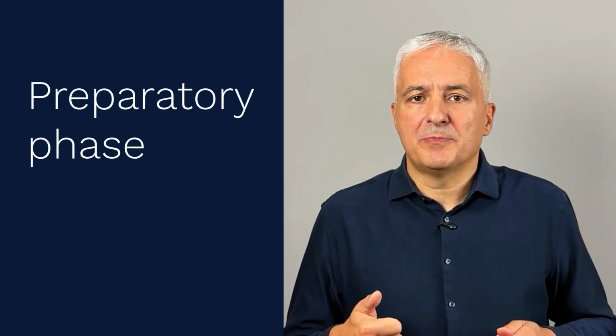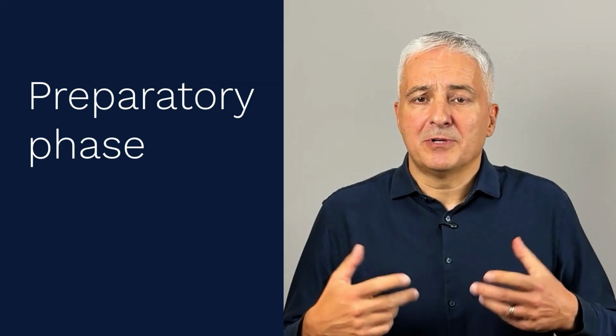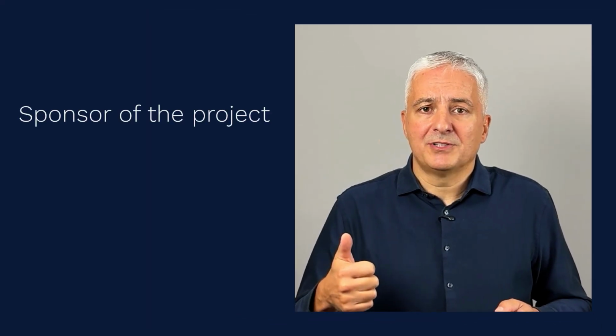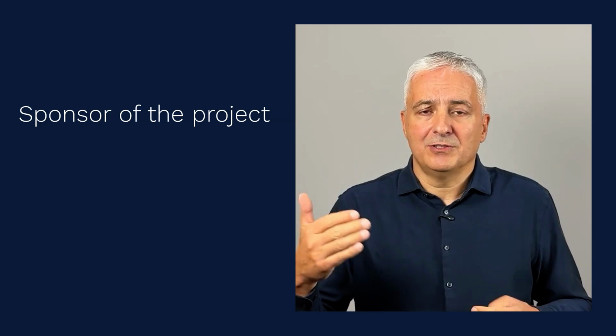Now, this first preparatory phase has the purpose of setting up everything that is important in the project. And this is where you start with the kickoff meeting with the client. And at this meeting, you have to agree with the client about a couple of key things. So you have to agree who will be the sponsor of the project from the side of the client.